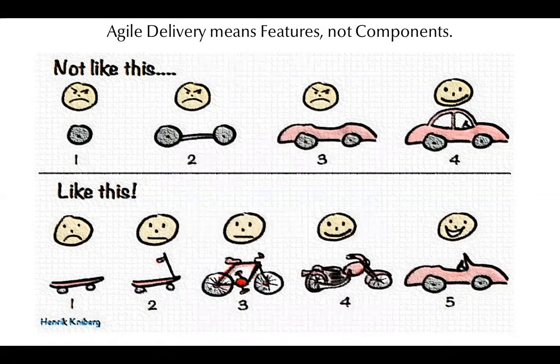And the trouble with doing things this way is, well, obviously we can't get value until we've assembled all the components, but more to the point, we can't quantify the progress until we get to the end. So we have this enormous long dark period where all we can really say is whether we are on time and under budget for delivering various components, whether we've slipped or not.